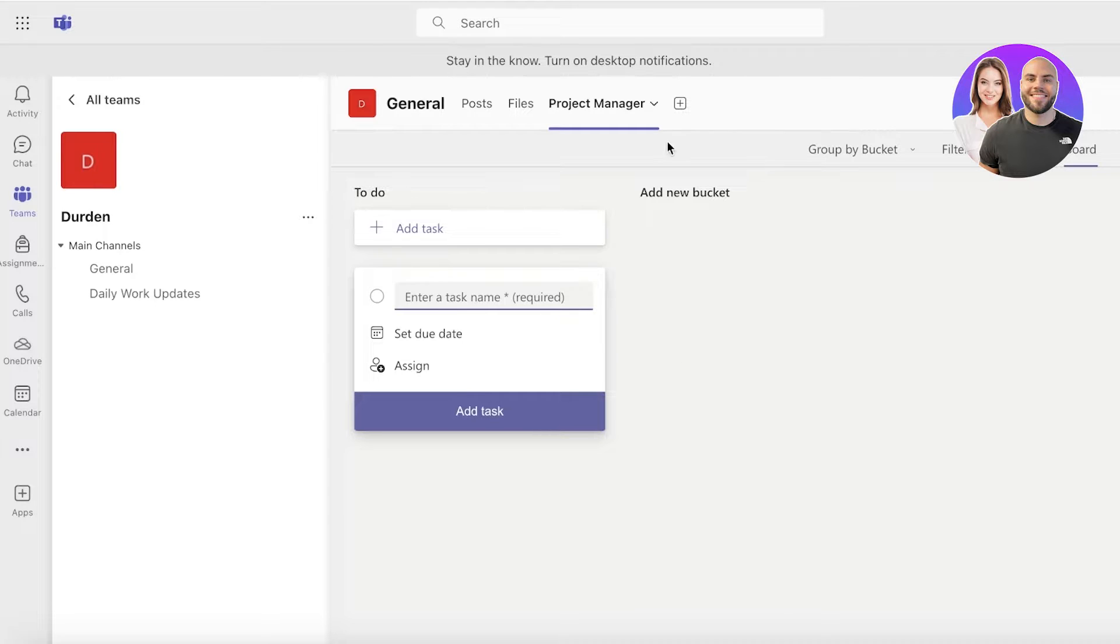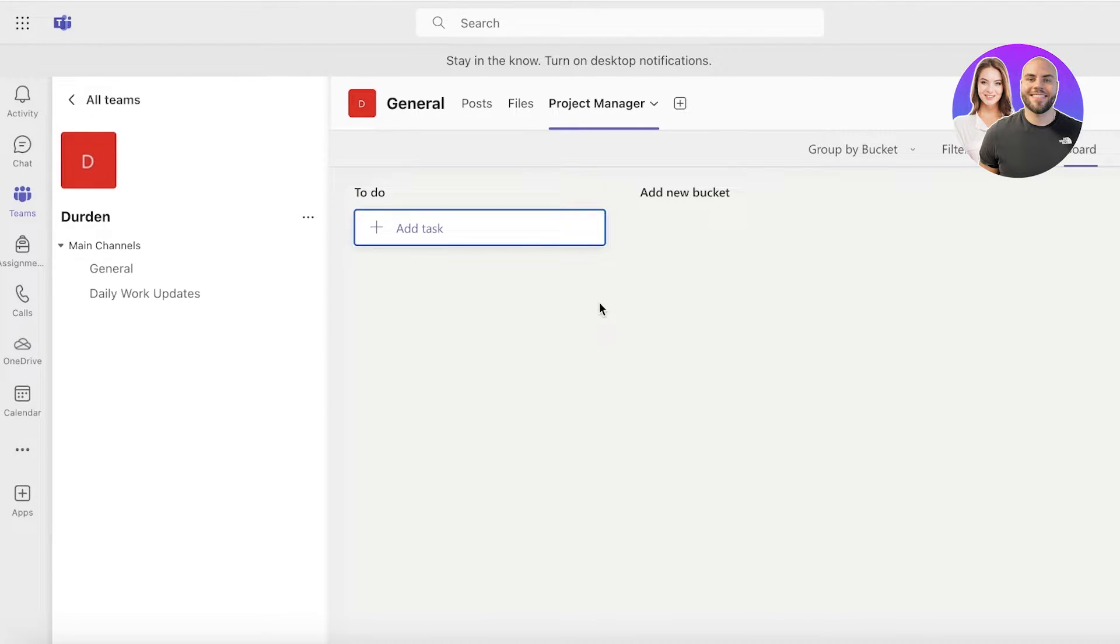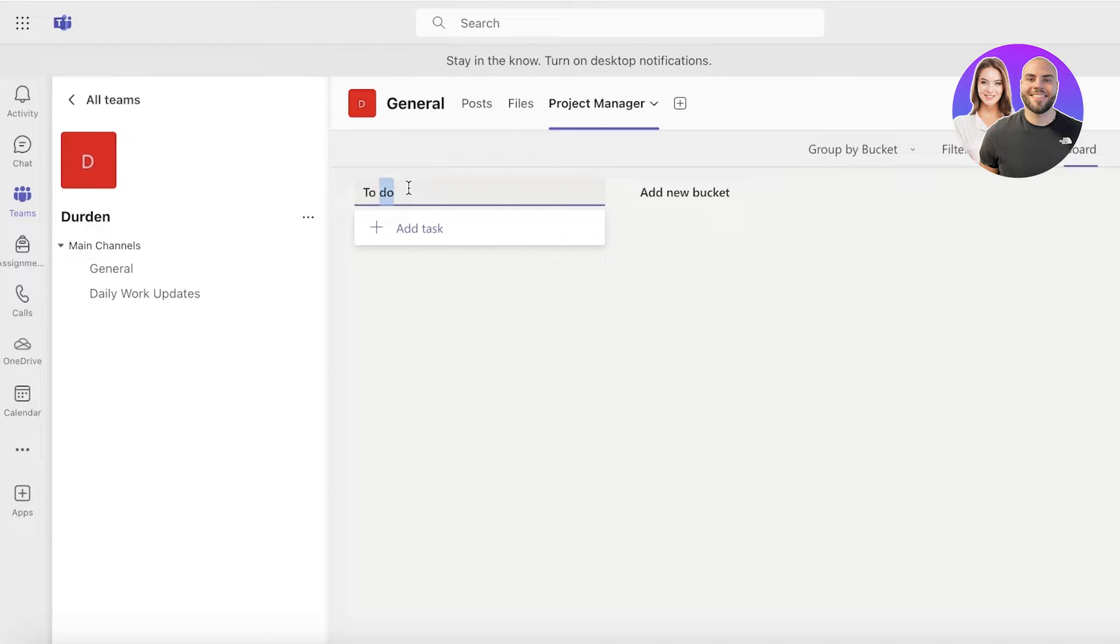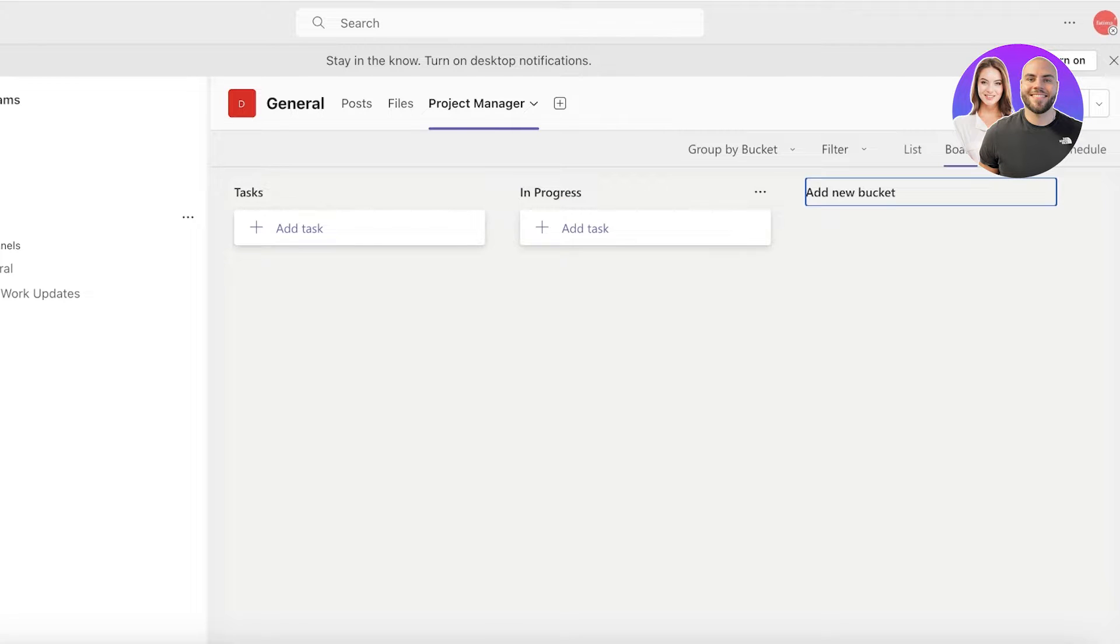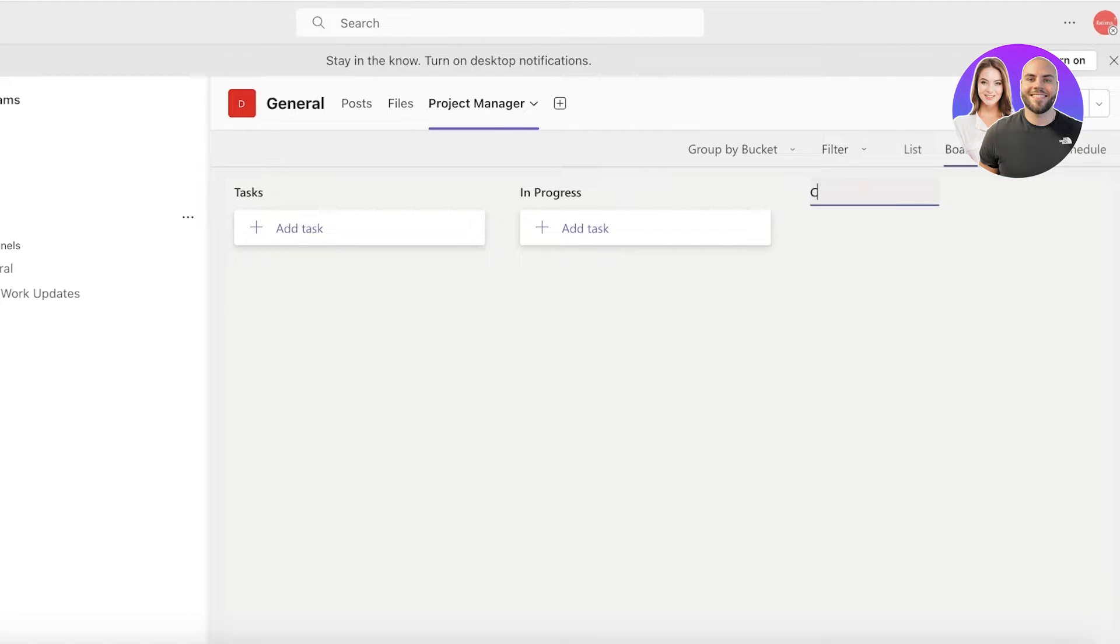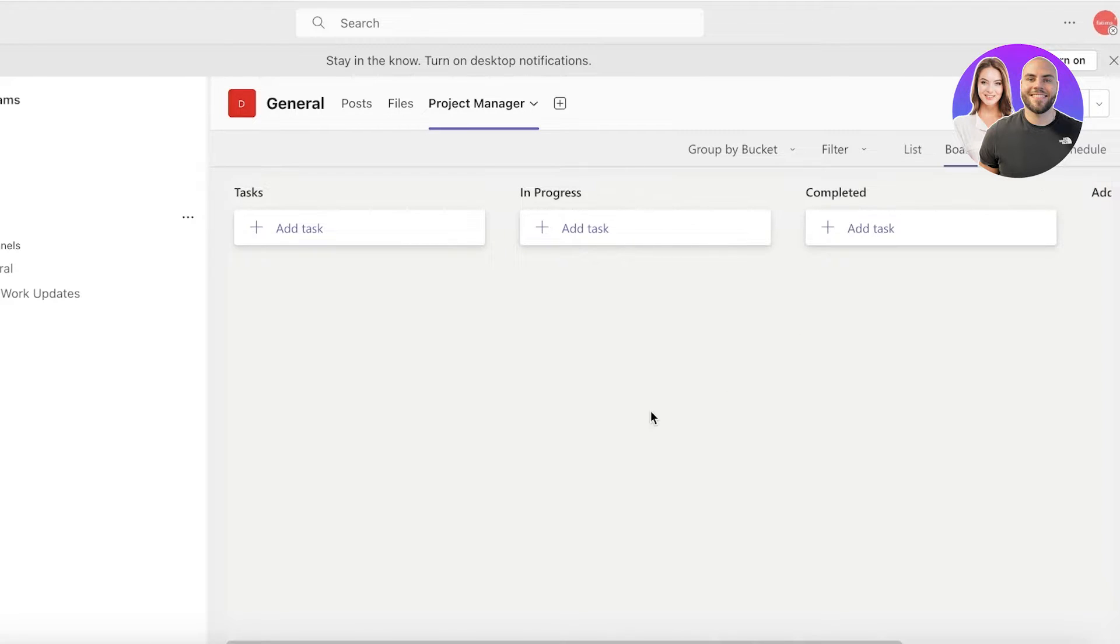Once you have added your project manager, you're going to have a few different buckets that you can categorize your tasks in. We have a to-do list which I just like to rename as tasks. Then I can add a new bucket which might be in progress, which might be things that are currently happening, and then we might have our final bucket which is for completed tasks. Now this is in the form of a board.